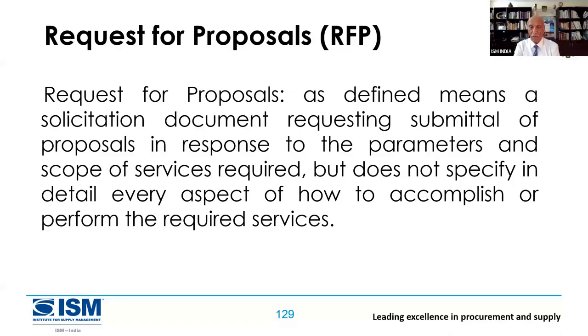Those specifications which are very tangible, very clear, we go with RFQ. But where we are looking for a solution, proposal means you're looking for a solution. Some guys may come with a very innovative solution. So those come under RFP, basically for services. One for services, one for goods.